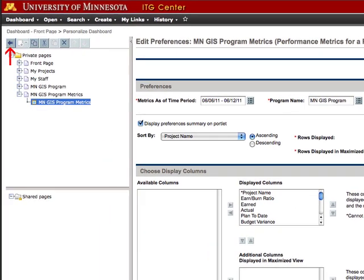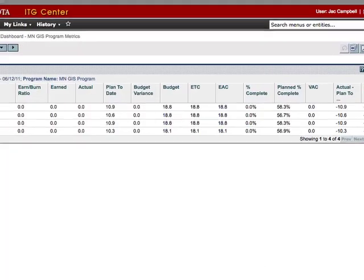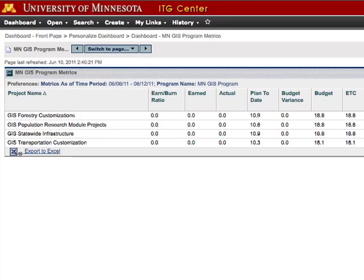To see the results, click the Go To Page View button. Once the dashboard is generated, we can see the portlet displays a single line for each project in the program that summarizes the metrics for the project. If you see a value for a particular project that is concerning and you'd like to dig deeper, you can add the Performance Metrics for a Project portlet to the dashboard and set it up to display the metrics for the specific project that may be having some issues. This portlet will break down the metrics for the project by activity, allowing you to see more detail and identify where the project may be having problems.